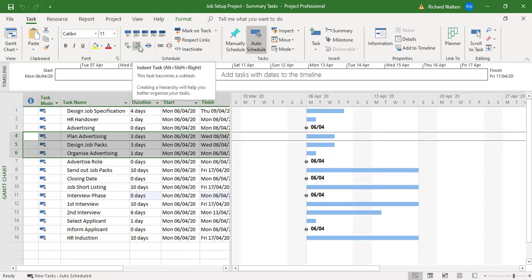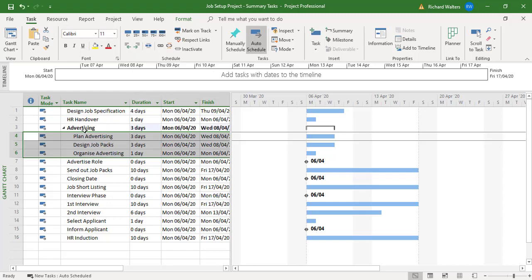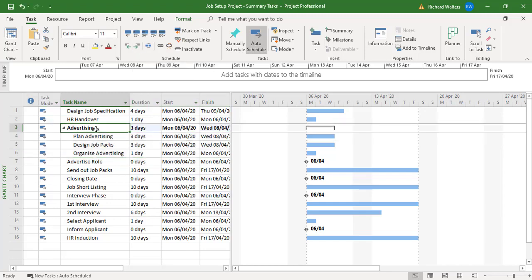This will then produce a summary task. Advertising produces a summary of three days because the longest duration right now - they are not linked yet - but at this point in time the longest duration is three days.